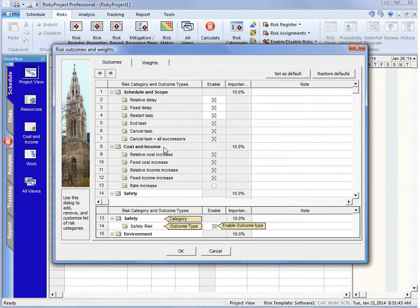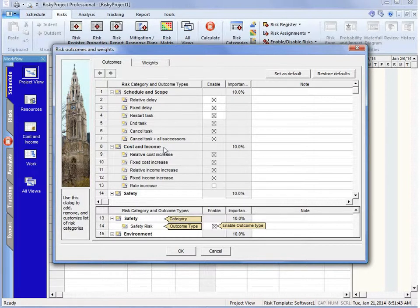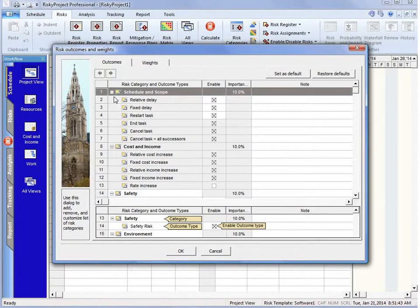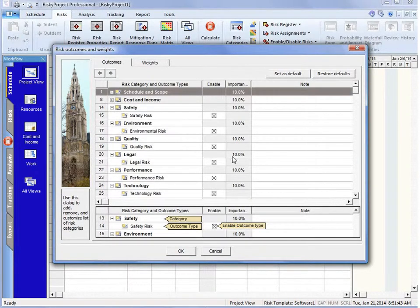Those are actually part of the Monte Carlo simulations. We need those to run the Monte Carlo simulations against cost and against schedule, so they cannot be removed. We can't really modify them, so we'll just collapse those.